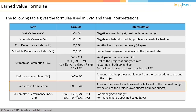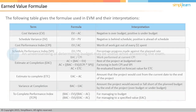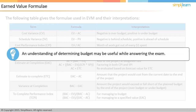Another parameter is the to-complete performance index (TCPI), which is the cost performance needed to achieve a desired outcome. If the project needs to be managed to the original budget (BAC), then TCPI is calculated as (BAC minus EV) divided by (BAC minus AC). If it has to be managed within a revised target (EAC), then TCPI is calculated as (BAC minus EV) divided by (EAC minus AC). Before the PMP exam, make a note of all earned value technique formulas.